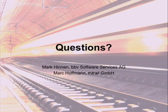Okay, that touches my second question, because you have the Scrum of testers, and in my experience it's quite problematic to actually coordinate this. If you just said, well, we just coordinate. Is that a problem for you? I mean, there's actually a person in charge. We have a test manager who is actually also the head of the Scrum of testers, and he's in charge of making all the coordination. It's not really fully self-organized, so there's one person in charge to make sure that this process works for all teams. Yeah, he does not show up in the individual teams.